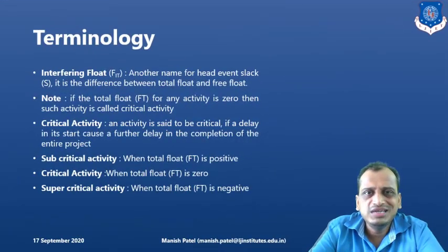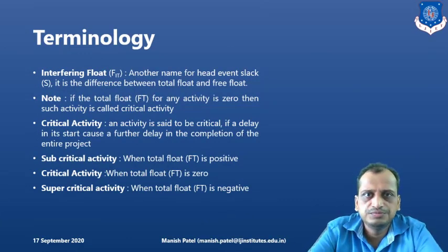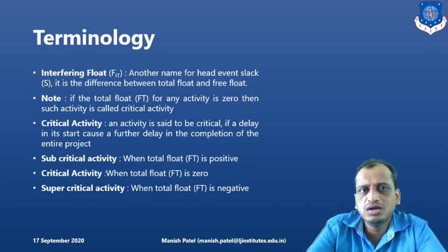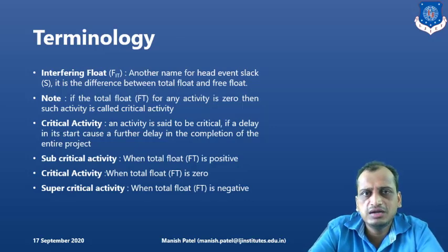What is interfering float? Interfering float is the difference of total float and the free float. Now, subcritical activities. What is subcritical? We already understood what critical activities are. Critical activities are those activities where the total float is zero. You cannot delay those activities, right? If you have delays, then it is going to affect the total project duration.